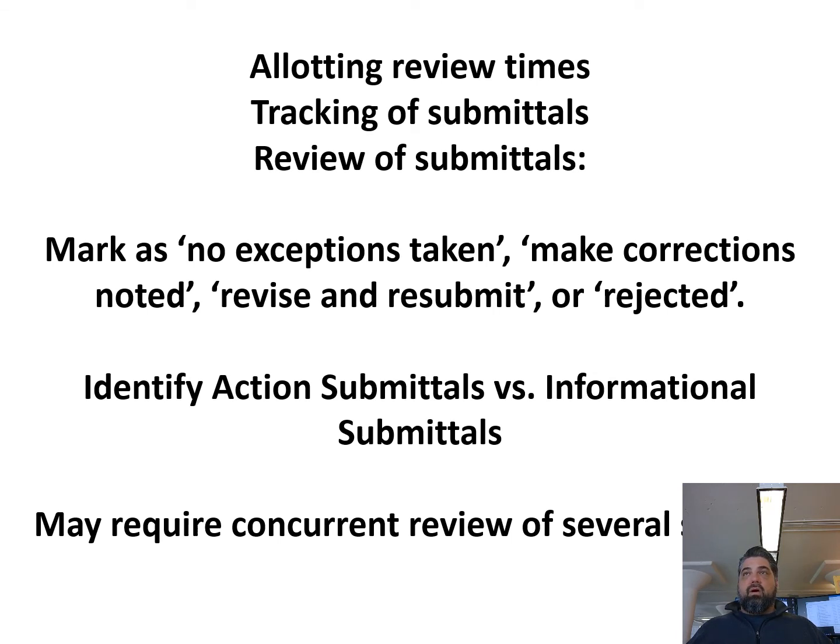Because you don't want to be the one responsible for a delay in the project, adding, I got to add a week to the project because the architect took 3 weeks to review the elevator submittal. You don't want that on you, because that could be a breach of duty then, and so you could be held responsible for that.